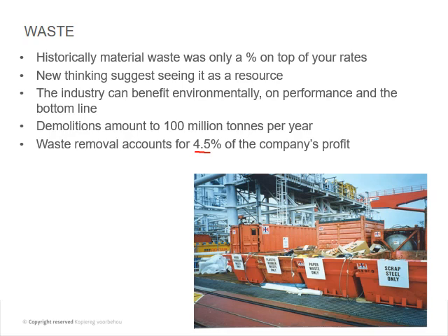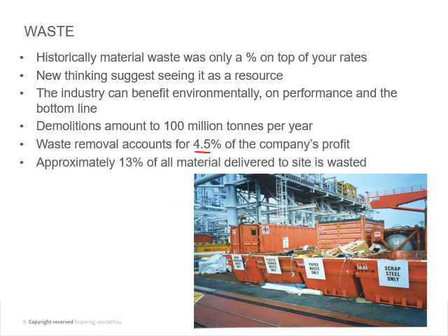If you're working on a million rands worth of project, that's more or less 45,000 rand, which you could have saved or put into your pocket. Then approximately 13% of all material delivered to site is wasted. That's quite a staggering amount. And that's just the waste of material.